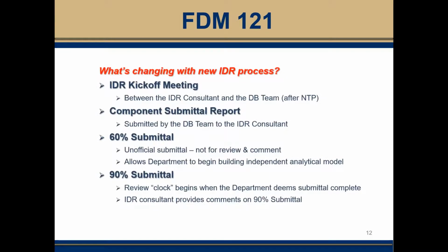So what will this process entail? Well, to begin, after award, an IDR kickoff meeting between the IDR consultant and design build team will be held to discuss the various Category 2 details. A line-by-line component submittal report will be provided to the IDR consultant, and when possible, a design schedule so the department may have a general outlook of the submittal and review dates.